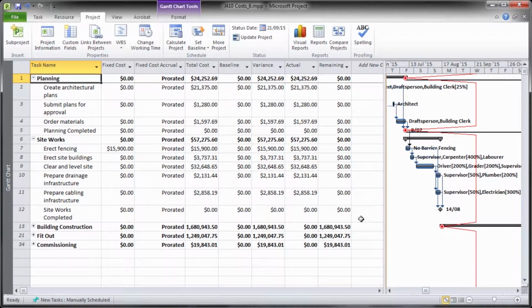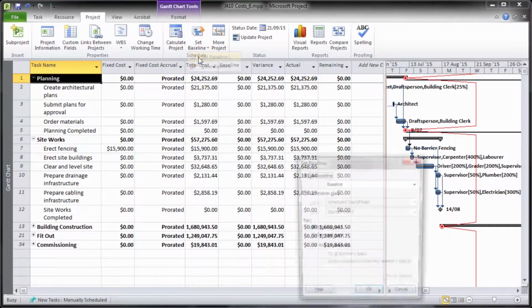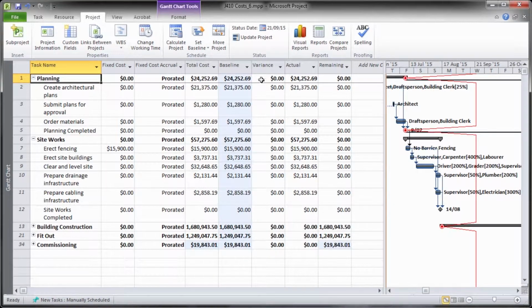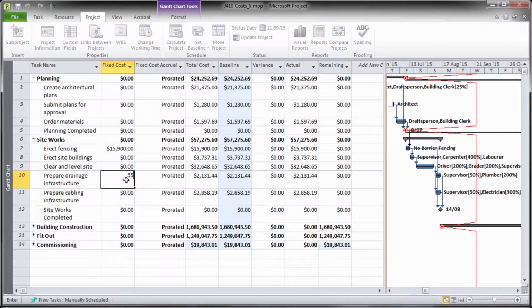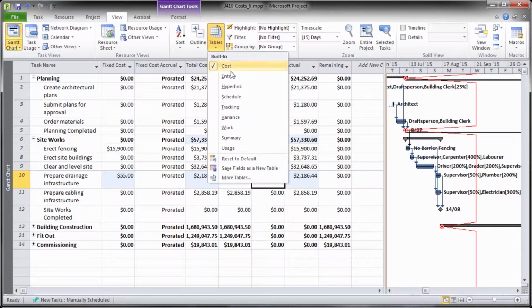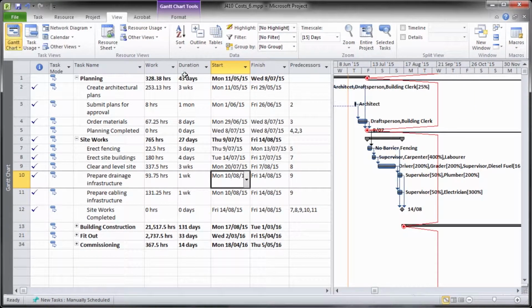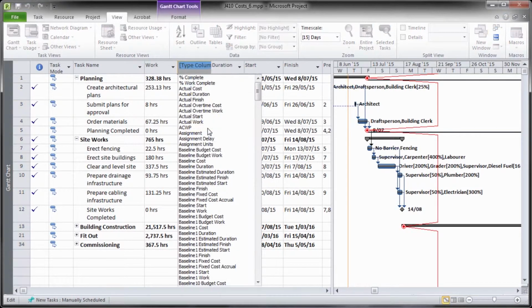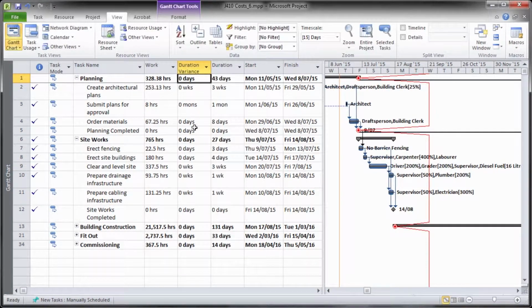The second part is tracking our project. So once we're live, we're then using Microsoft Project to input variance to things like time, cost, duration, work. So a task might take longer because something was late being delivered. The scope of works might have changed. The customer added some extra detail, or we had some issues which created problems elsewhere. So all of these variances we can report on.